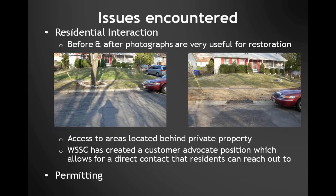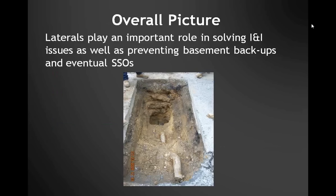Permitting is still required in some instances. In this region we have multiple roadway governing bodies — federal, state, or local — as well as parkland and environmentally sensitive areas with multiple authorities. Tree removal is taken very seriously and also requires permitting depending on location. The process of obtaining permits complicates the assembly of a contract package, so there are times when multiple task orders are on hold until all documentation is received. Overall, laterals play an important role in solving our system's I&I issues as well as preventing basement backups and SSOs. Rehab of active laterals and proper abandonment of laterals no longer in service will ultimately help us achieve this goal.